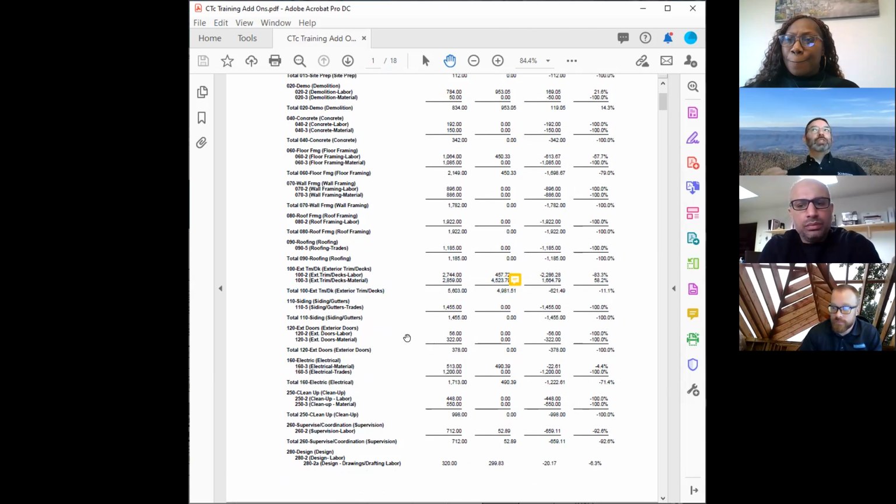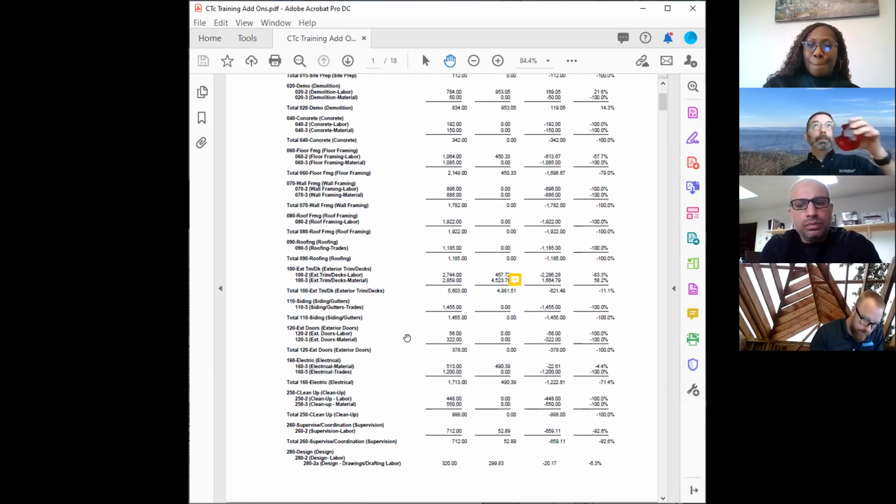So most of the time, you should not be surprised by your material and your trade quotes, because you as the PM should know what you signed off on for your trades. Was it in budget? Was it out of budget? What was signed off for materials? Was it in budget or out of budget? The places that you'll get surprised will be particularly in-house labor, and also the framing and trim materials that we purchase in-house. Those are particular places where you'll get caught by surprise if you're not out in front of your projects.